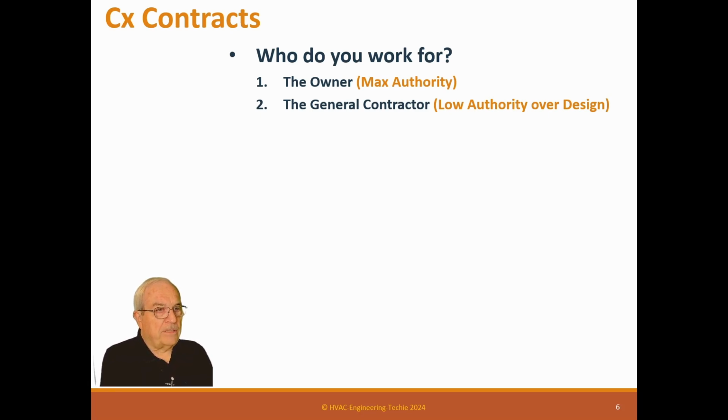General contractor is certainly possible, especially if they're a CM at risk. You know, if they have the actual risk for the project and the owner is a little more outside that deal, then the general contractor is a good fit. But on a regular project, he is not a good fit, because what happens, and I've done it all these ways, is it's a low authority over design. If it's a bid build design, the general contractor is not responsible for the design, so he pays attention to everything that's in his silo, in his envelope, but doesn't pay any attention to anything else. So then you'll have to fight through that, the general contractor, if he's ignoring anything on the design side, you would need to get it.